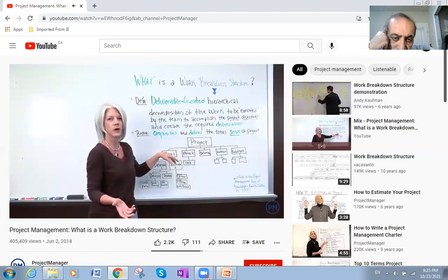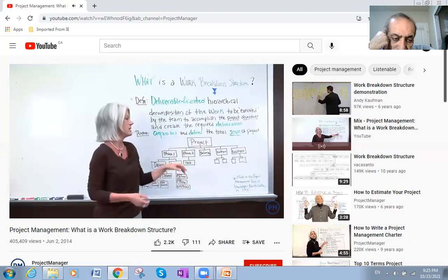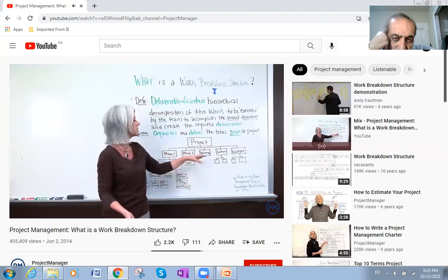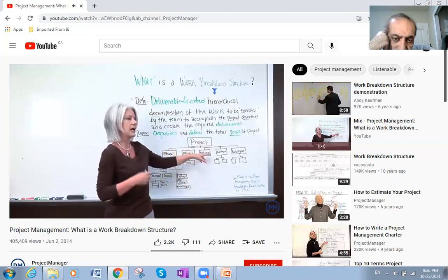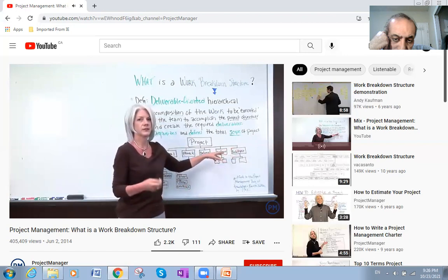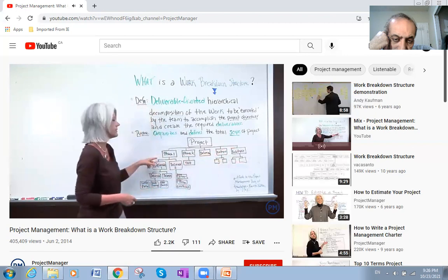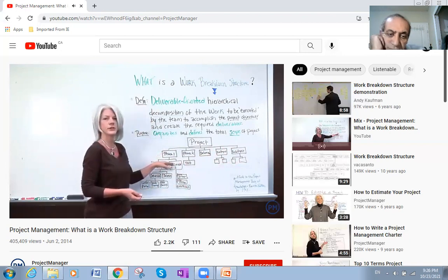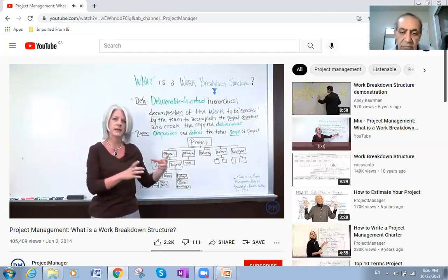And in this specific one, you may work on projects that include phases. So there may be a phase one, phase two, or multiple phases. This one has two phases and a main high-level deliverable produced. This also has sub-projects, which can be broken down as well. If you look at phase one and break it down, it has two deliverables beneath the phase. So it's producing two main deliverables.